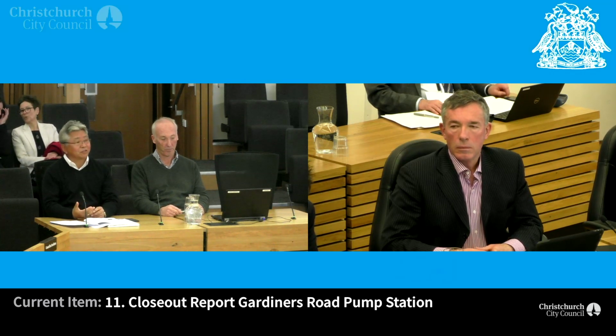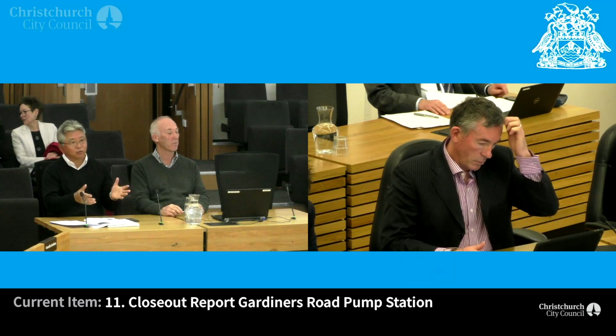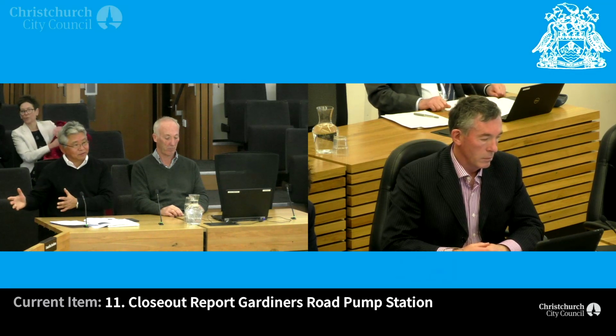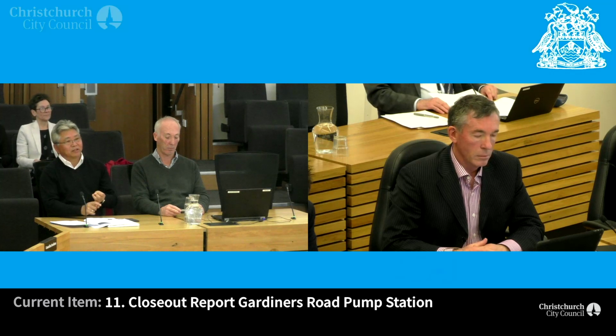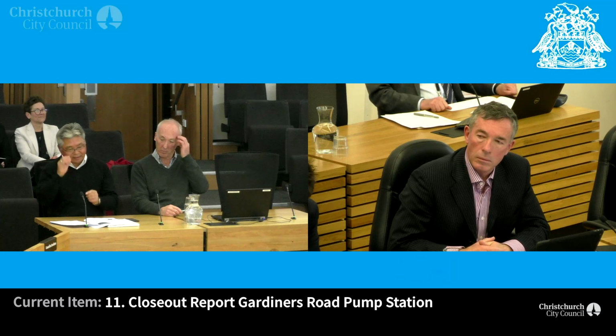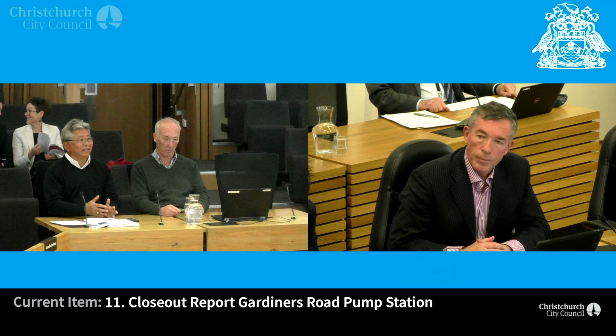learned register for pump station in general. So whatever we learn, we make changes here, which is carried out to our next pump station. At the moment we're working on the Jeffreys pump station, the Benarary, and the new Sydenham. So all lessons learned and risk registers are carried from one project to the other, and introduced at the early start of the project, saying these are the things you went through. Let us review it and do things which we can do.